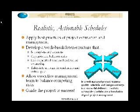And in the negotiation process, we've allowed executive management to balance the various competing risks. So we've gone back, presented them with options, they've come back to us, said, okay, do this, do that, try to pursue options that make sense, like reducing system scope and reducing test scope rather than things that don't make sense, like throwing a lot of people at it, or just cutting it off and saying, well, we'll be done on this date. That doesn't make a lot of sense either. And then once we have this schedule in place, we can use this as a way of guiding the project to success by weekly or twice a week or perhaps even every day going through the Gantt chart and looking at where do we stand.